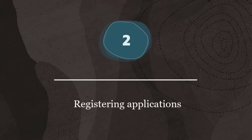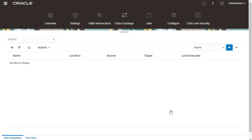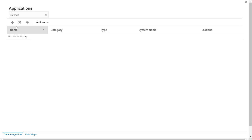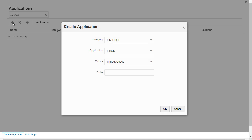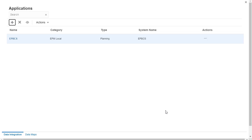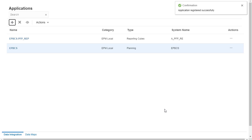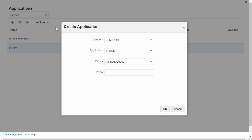Step 2: registering applications. Data integration requires an application definition for source and target applications. EPM local applications enable you to synchronize between data or reporting cubes, or move data between different input cubes. I'll add my base planning application, reporting application, and applications used for loading metadata.